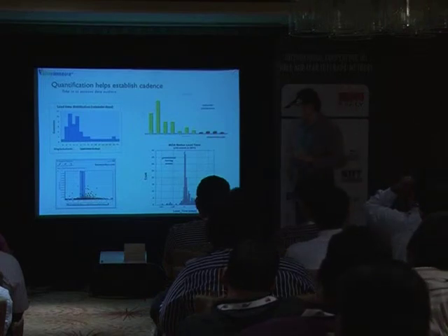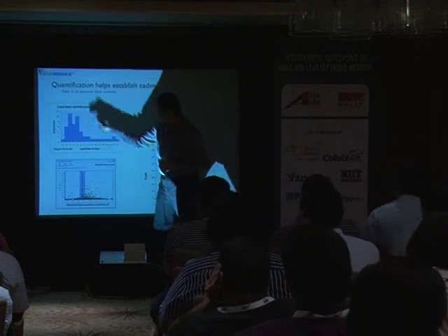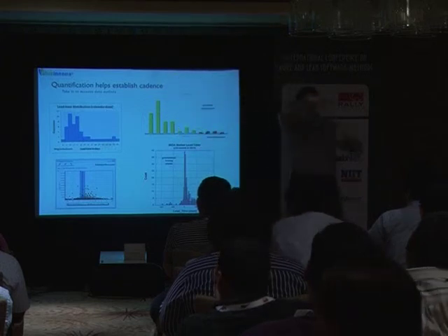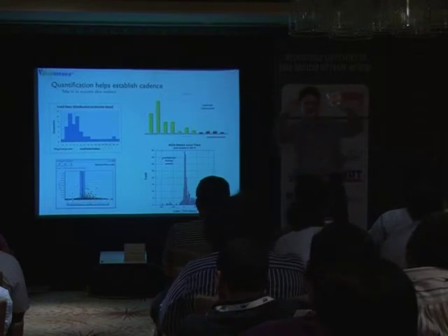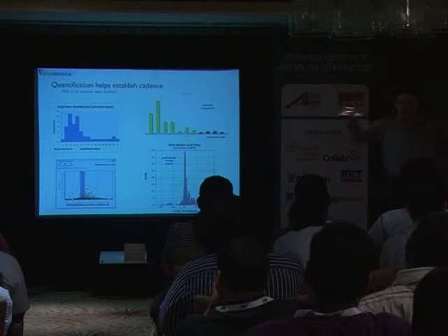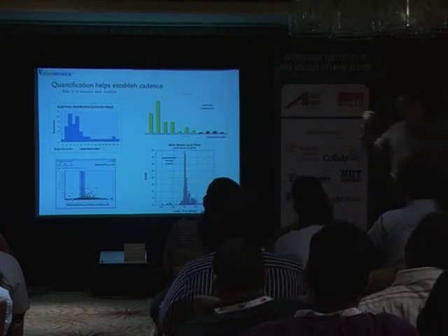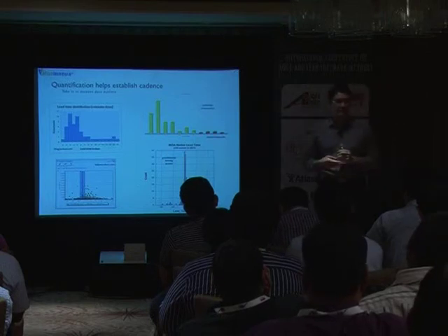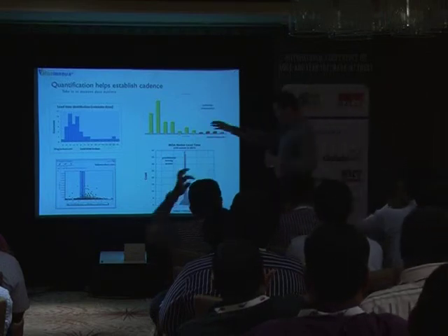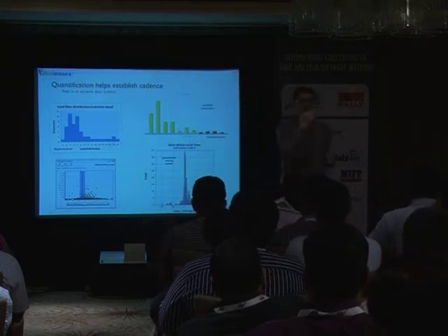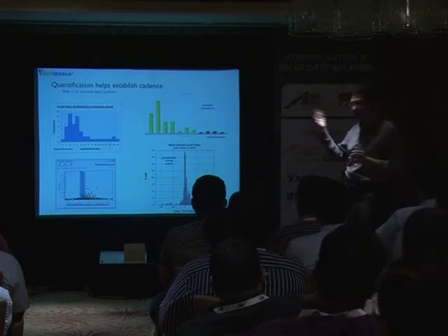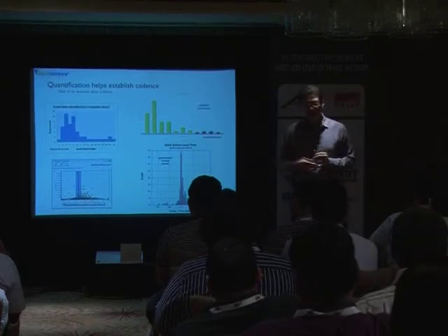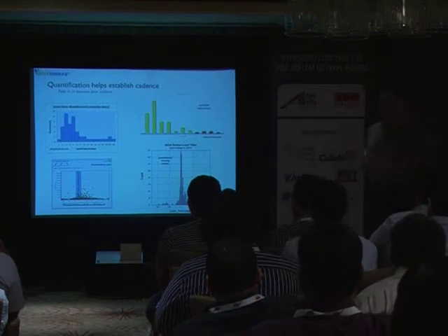And I can make promises to my customer based on that. But most of the time, we made a mistake of quantifying only up until this part, or this part here. The curve can be quite uniform, or it can lean a little bit to one side or the other. And we could say, okay, I have an idea of what my behavior is, for example, of how long the user stories that I'm working on take to be delivered. I start quantifying that. If I only take this main curve and say, I'm going to take my one sigma, and then tell the customer, Mr. Customer, 93% of the user stories that we're creating, we're going to deliver to you every 7 days or less.